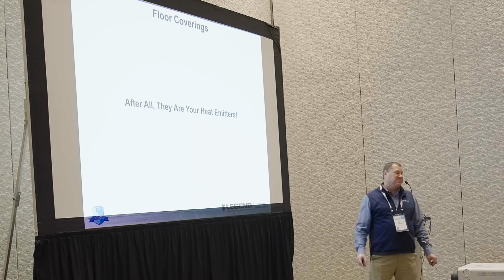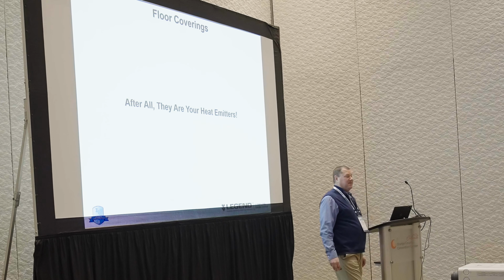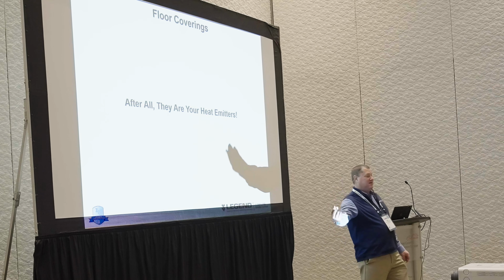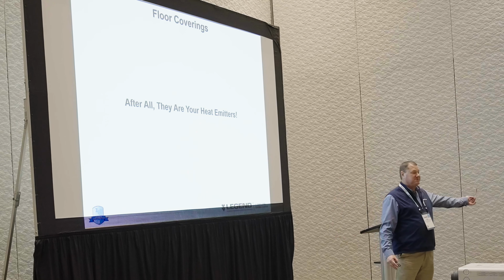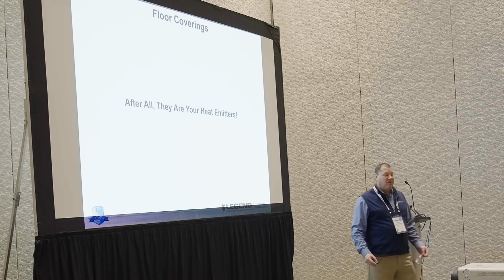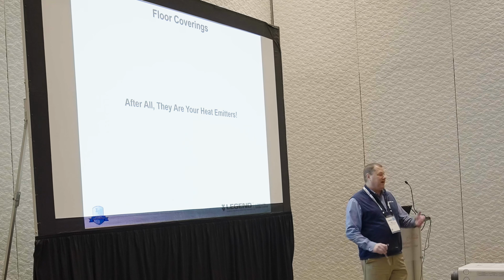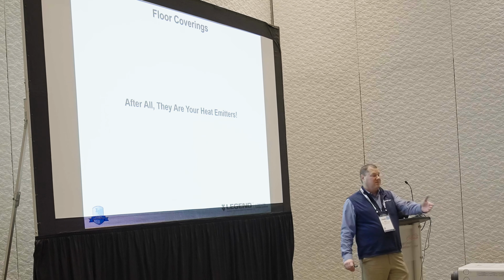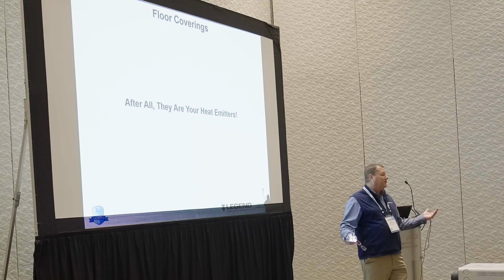But at the design stage, we might not know what that floor coverage is going to be. They might say they want this, and then the custom home gets to a certain point, and they're cutting the budget, and they switch it to this. And just know, one of the best practices is, hey, here's what we thought it was going to be. We're getting ready to do the finish. What are those floor coverings?